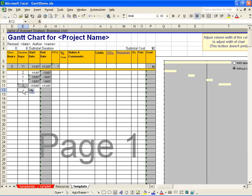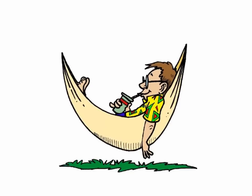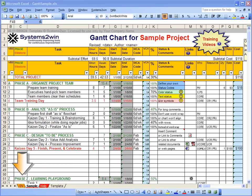Once you start using your Gantt chart, you'll need to consider your work calendar — for example, planning to work some weekends and not others. Full-featured project management software allows you to define a sophisticated shop calendar with all work days and holidays precisely defined, but any seasoned project manager knows most project plans aren't that precise anyway. The DV worksheet contains clear instructions for how to use your work calendar adjustment codes.